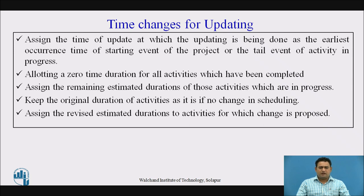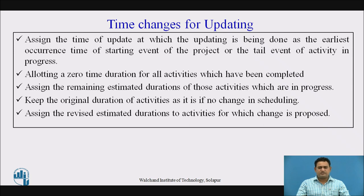The overall duration of an activity may change due to some revision, addition of activity, or introduction of new technology in the execution. Assign the revised estimate durations to the activities for which the change is proposed. We have to collect all the data from the information system — what are the ongoing activities, what are the completed ones, and what activities are coming in the future — and accordingly change the times for each activity.